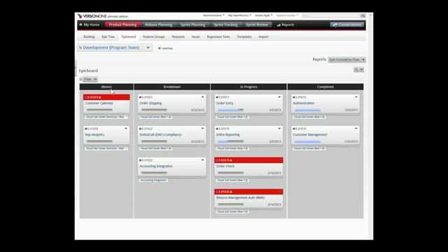And so in this case, if I'm saying it's green, green would be defined as the current plan we have is working pretty well. If I said it was yellow or red, that would say that what we planned when we maybe did our release planning, we're not going to be able to deliver the way we thought. We've learned something new. And if you wanted to start capturing exactly what is driving the health from the way that a program manager is thinking about it, that's where you can start creating blocking issues or capturing issues in version 1, as I mentioned.